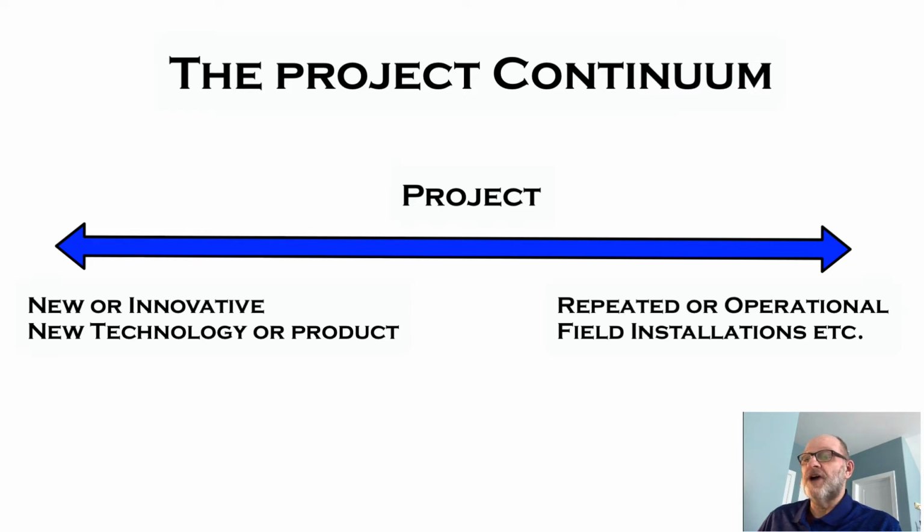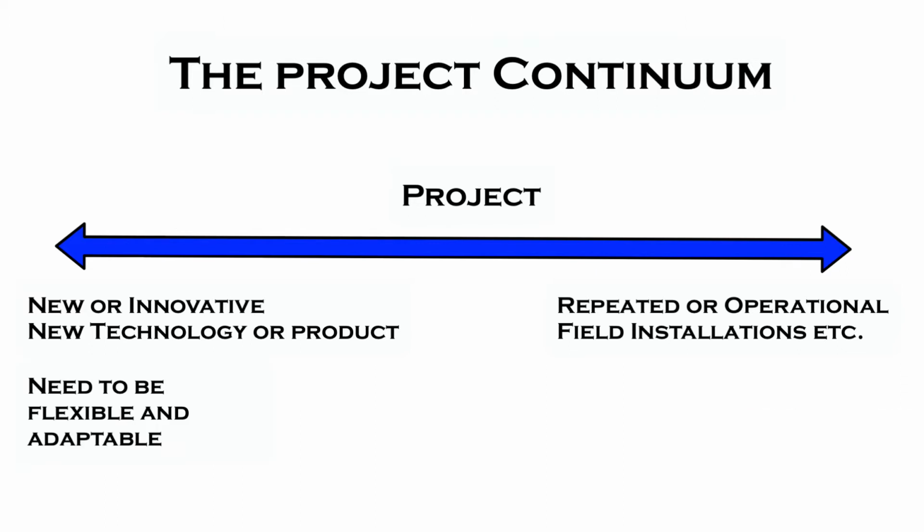For example, projects that include tasks or technologies new to the team need a very adaptive design so they can twist and turn to stay efficient. On the other hand, familiar tasks and technologies need a very structured design so the supporting and shared resources can be effective and efficient in supporting the project.